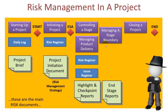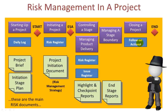At the end of every stage we use the Managing a Stage Boundary process and the end stage report will contain, amongst other things, the status of any risks. When it comes to closing a project, any risks which could affect the operational life of the end product will be captured in the follow-on actions so that appropriate operational or business-as-usual staff can carry on managing such risks.